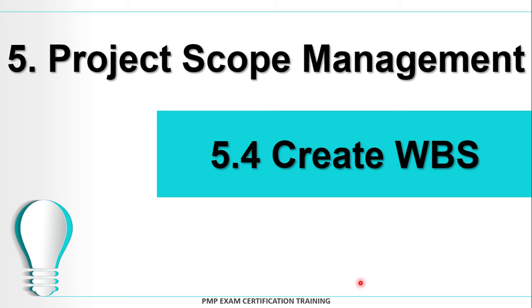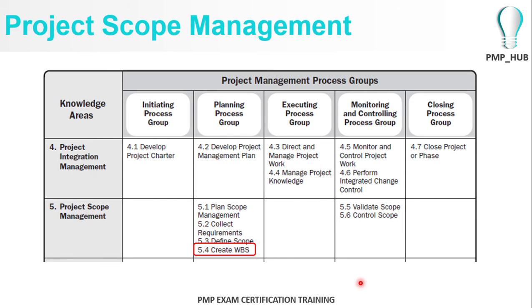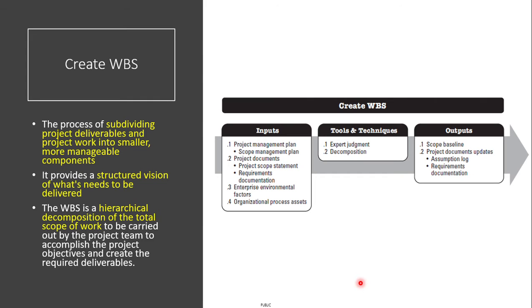So you have to create something called a work breakdown structure, where you try to subdivide certain deliverables into smaller and smaller manageable components and structure them so that you get more visibility. So you as a project manager start work on the scope together with your team, and you try to detail it out into smaller manageable components to create the work breakdown structure.